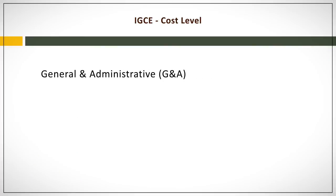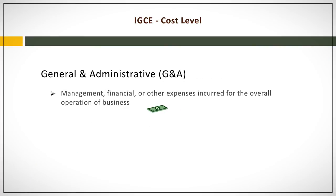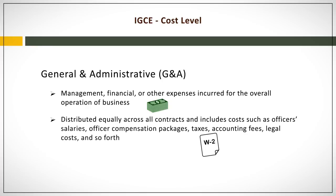General and administrative costs are any management, financial, or other expenses incurred for the overall operation of business. These costs are distributed equally across all contracts and include costs such as officer's salaries, officer compensation packages, taxes, accounting fees, legal costs, and so forth. G&A is typically expressed as a percentage of the total costs before profit or fee.